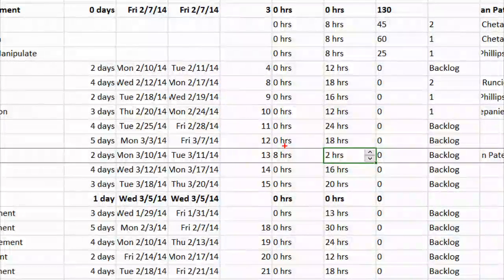Because I know around timesheets, we're talking about timesheet categories, timesheet periods, and capturing actuals. Do you want to talk a little bit about some of the scenario options for moving those actuals and what to do with them? Sure. Let's say you are doing a project schedule and you really don't know what it's going to take. Then you can publish that feature to the team lead and let them estimate the time, and then get the estimate into your project schedule that way. That way you are getting buy-in from the dev team. They are figuring out what it is really going to take to do that work, instead of just having a number thrown at them by the project manager. Again, that's custom fields, right? Yeah. Okay. So that way it is more useful.